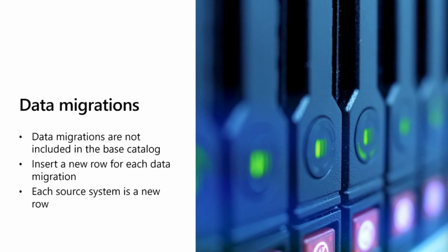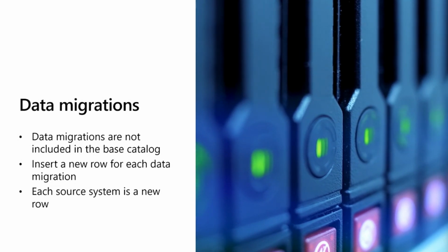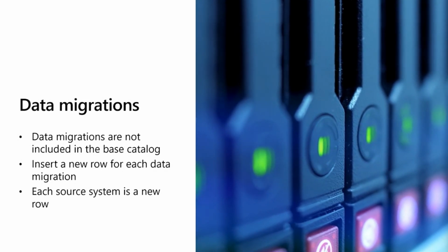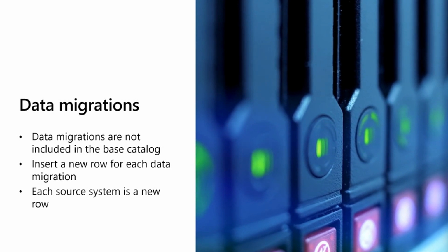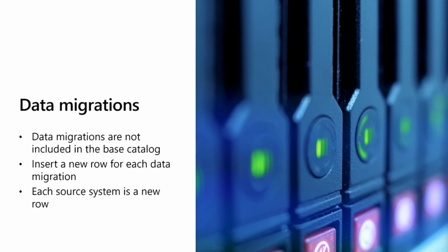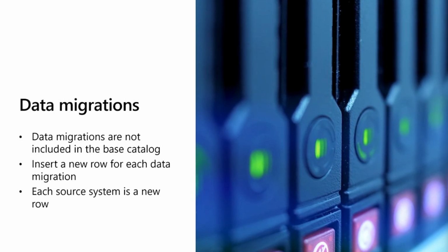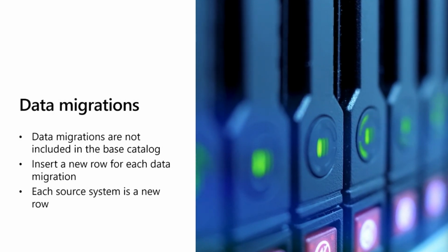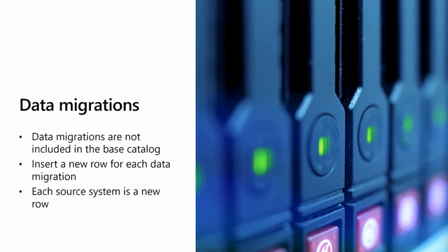So it's important to remember that you'll want to include and identify all those data migrations that are going to be needed at the onset of your project. This is an important process, and we recommend that you insert one new row for each data migration that needs to be included in your business and in your project.